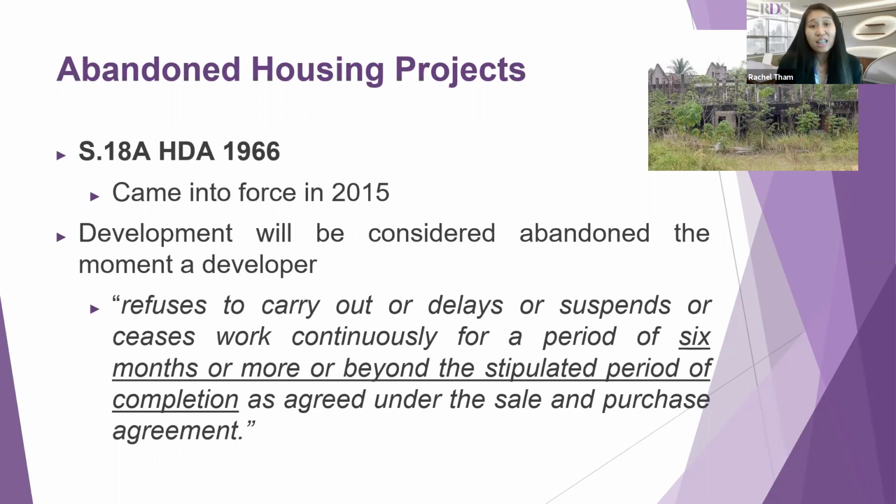The effect of it is that the licensed housing developer shall be guilty of an offence and shall be liable to a fine of 250,000 ringgit Malaysia to 500,000 ringgit Malaysia or to imprisonment for a term not exceeding 3 years or both.